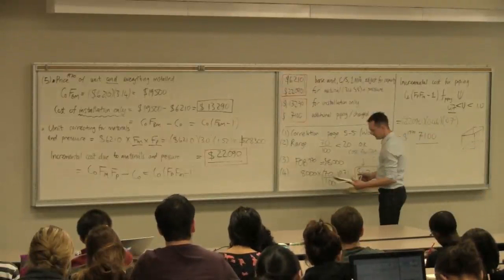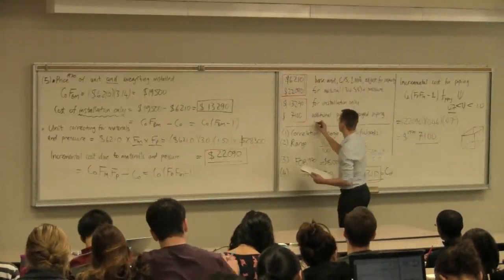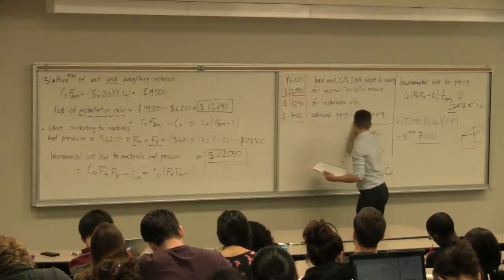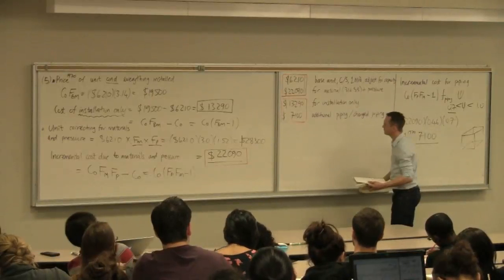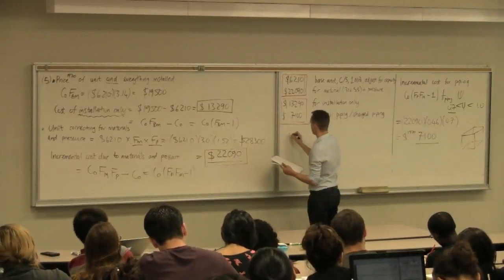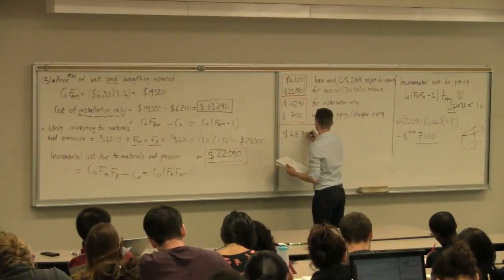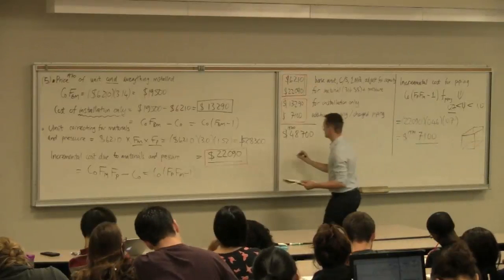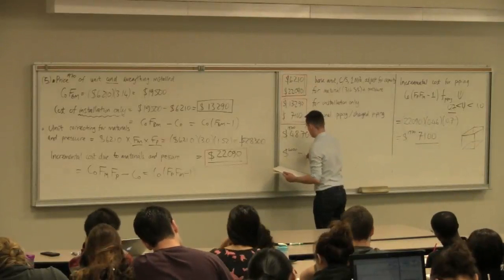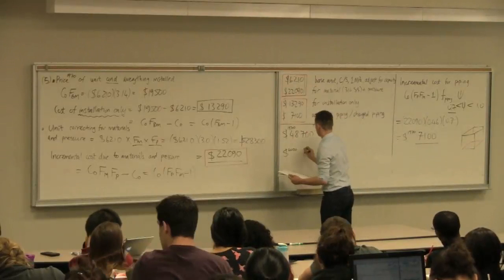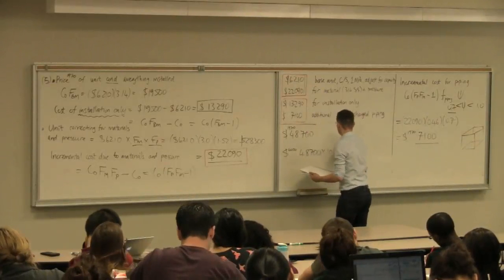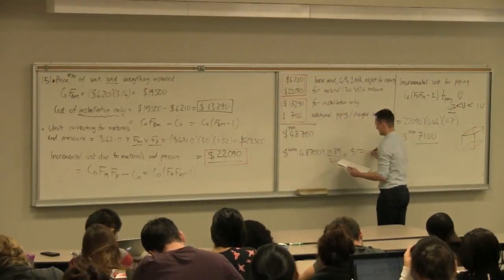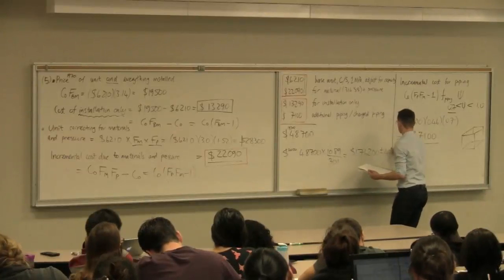And if you sum those up, you get the number. So if you add those up, you would then get $48,700. Inflate that up then to the current year, $48,700 times 1089 divided by 301 gets you $176,200 plus or minus 40%.